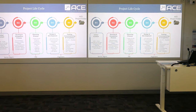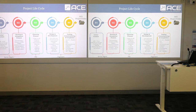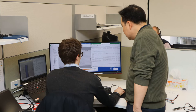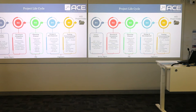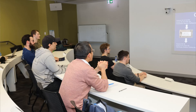The first stage is initial contact. Any projects we get at ACE come through tendering, quotation, referrals, and maintaining existing clients. The second stage is quoting — we quote for the project, it gets accepted, and we know we have a project in hand. The quoting and accepting process involves a lot of documentation, looked after by senior management at ACE. This includes design criteria, design requirements, inclusions, exclusions, assumptions, and any variations, all captured in a shared folder on our ACE SharePoint.